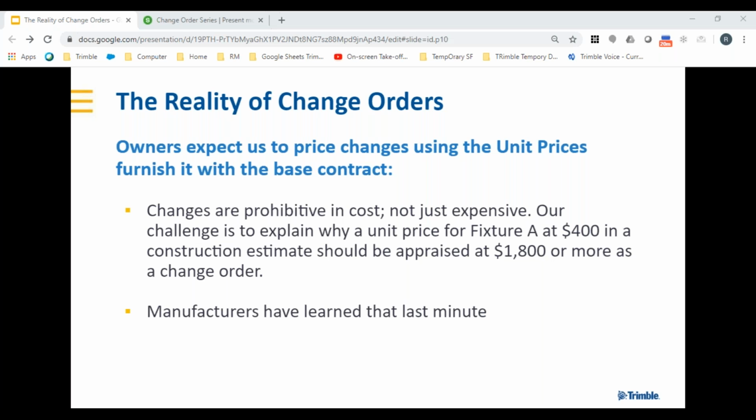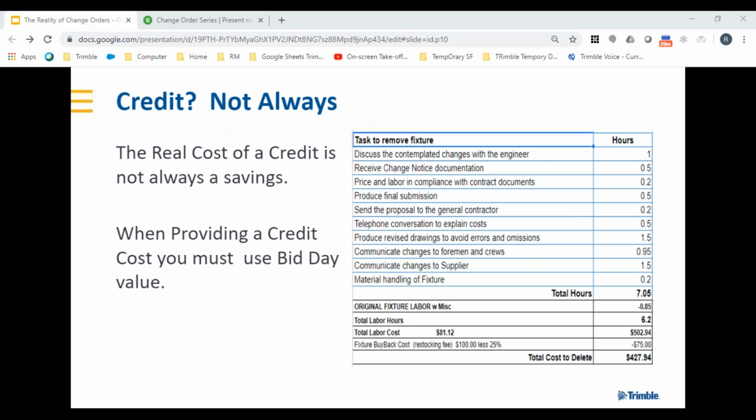When I'm going up on that floor initially, I can pretty much walk that material from the point of entry straight across because I'm not having to work around anything but maybe studs. Later, we've got drywall, we've got wall finishes, we've got things that we have to concern ourselves with. I can't just throw two bundles up on my shoulder and bounce through. Now I'm using two people or watching both ends of that, or whatever it is that's slowing my progression down. So simple illustration there, but something we all relate to. So when we lock ourselves down in these adds or these deducts, we're just feeding the wrong side of the machine. We're feeding the client side and not our bottom line.